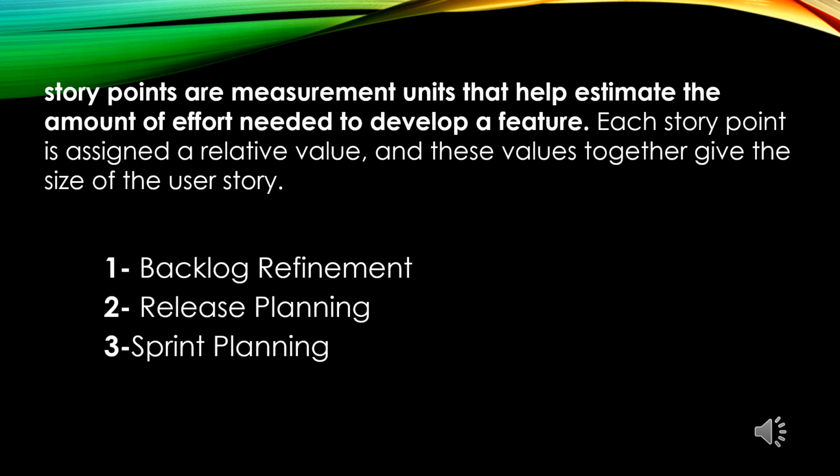This is planning that takes a high-level look at the next few months and works with many teams that take a first-guess estimate at all stories in the release planning. It is understood in these teams that these estimates are rough guesses used for general planning purposes, and they usually revisit the estimate in backlog refinement closer to actually working the item. Third is sprint planning. It is not common practice anymore to estimate right at sprint planning, but it still happens sometimes. Usually this happens with the stories that